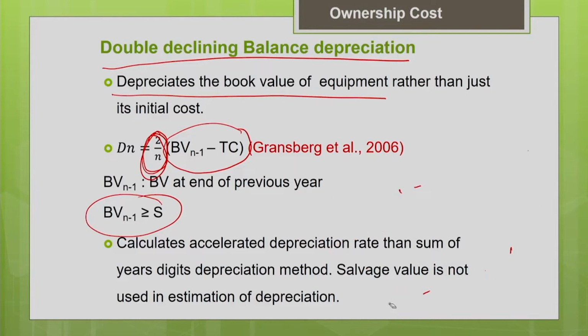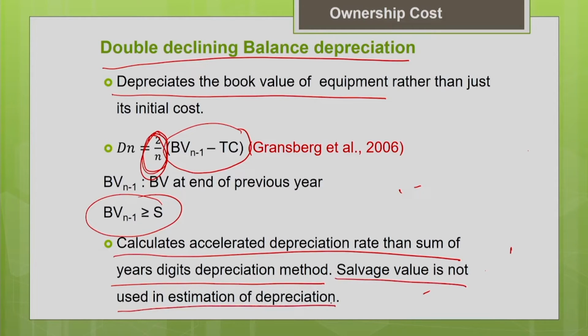So this method calculates the accelerated depreciation rate than the sum of years digit method. And one more thing to be noted is, you are not using the salvage value during estimation of depreciation. So this also you should keep in mind.